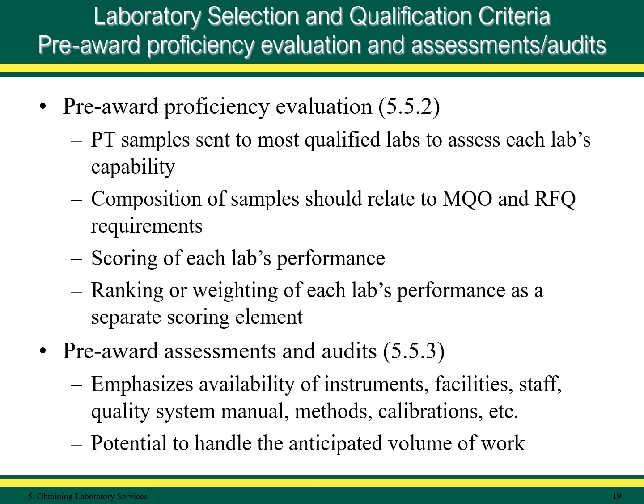Slide 19, Laboratory Selection and Qualification Criteria. Pre-award proficiency evaluations are addressed in MARLAP Section 5.5.2. Some organizations may elect to send proficiency or PT samples, sometimes referred to as performance evaluation or PE samples, to the laboratories that meet a certain scoring criteria in order to demonstrate the laboratory's analytical capability.